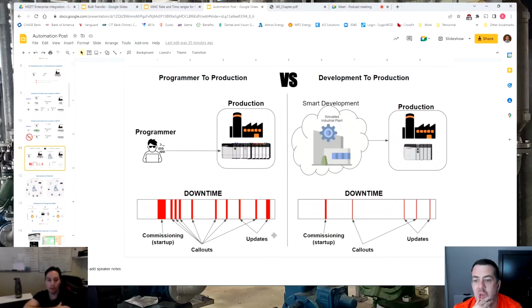How do you get to the point where you can show the customer what you're building? You can provide mock-ups, but until they use it, they're not fully on board. I always say we're going to get through the startup, and then anything you don't like, put it down in writing, submit it to me, and I will make those changes. But let's get through the startup first, because even if they don't like what the screen looks like, the screen functions. Right.